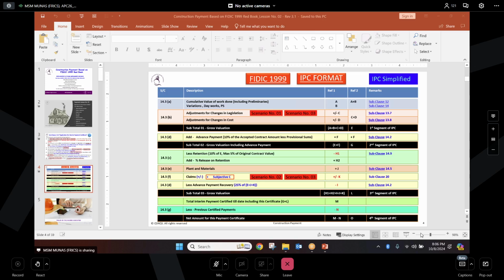Remember, I have given the example. Sometimes a change in the quantity will result in cost changes, like cost per unit, like transportation cost. So again, that should be satisfied. And finally, they mention this is not specified as a fixed rate item. Only then can you go for a varied rate. So to make it very precise for you,